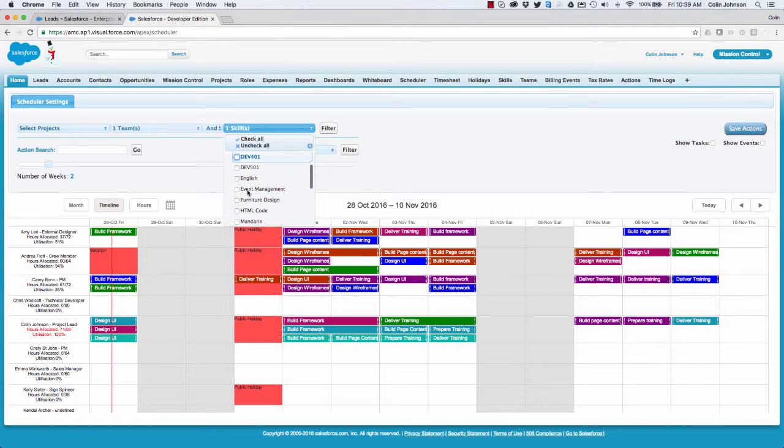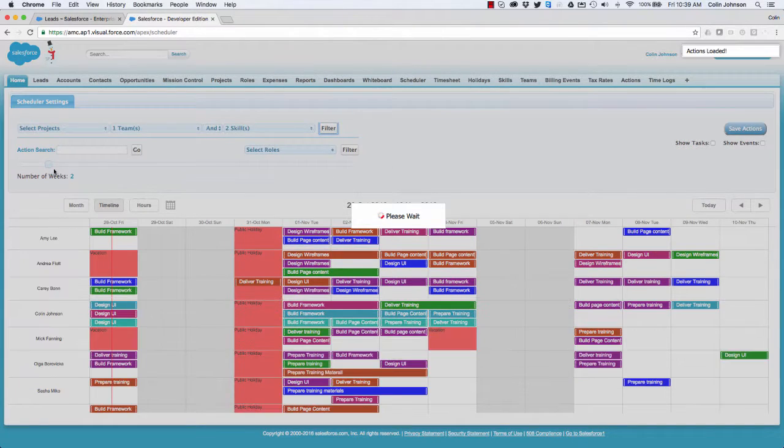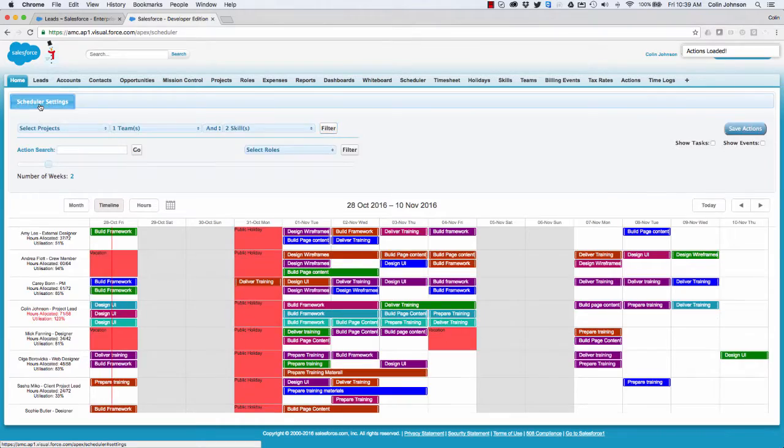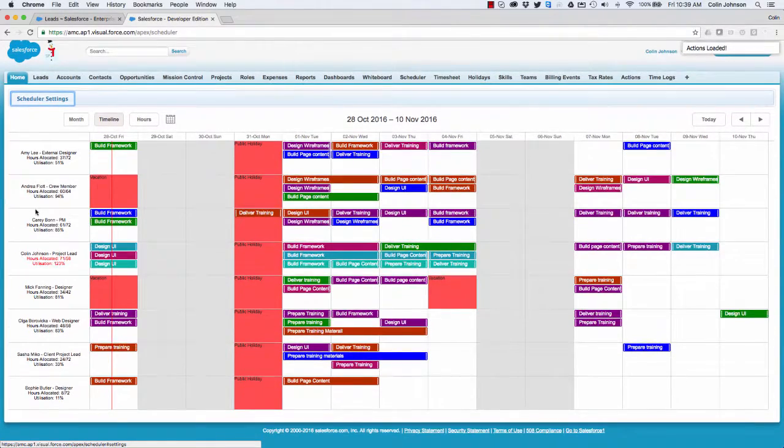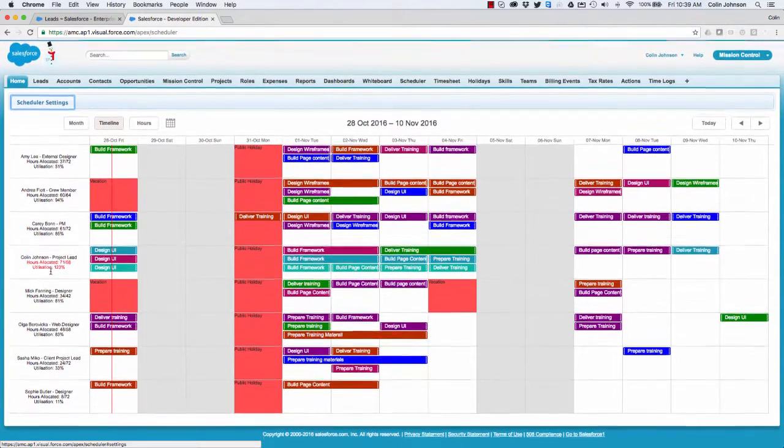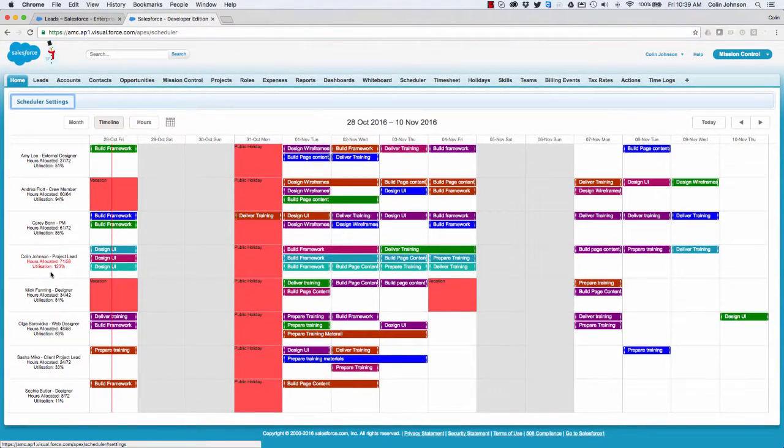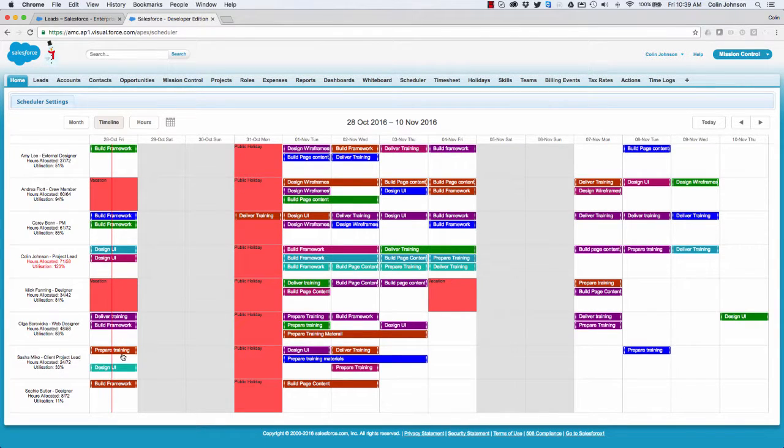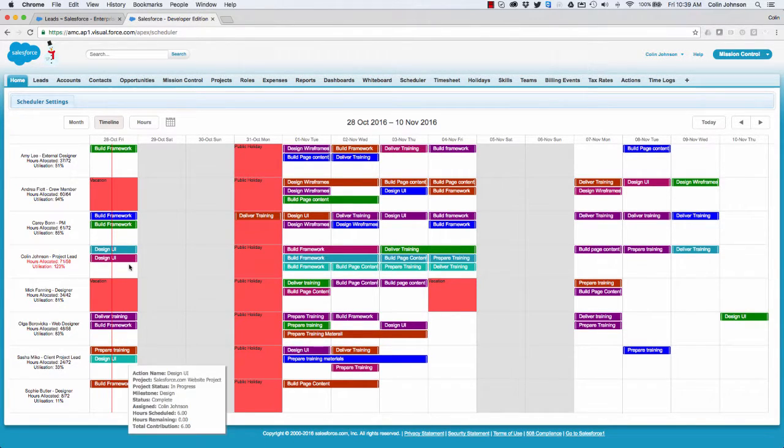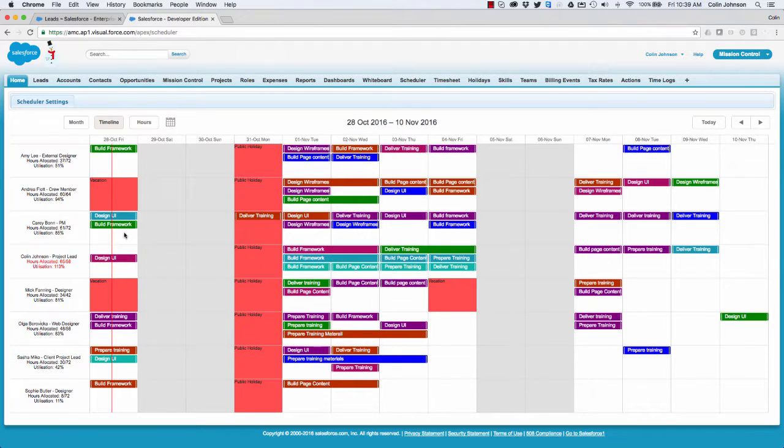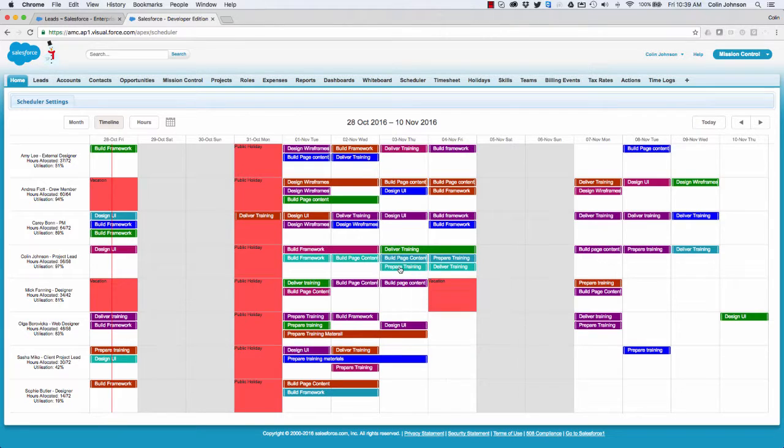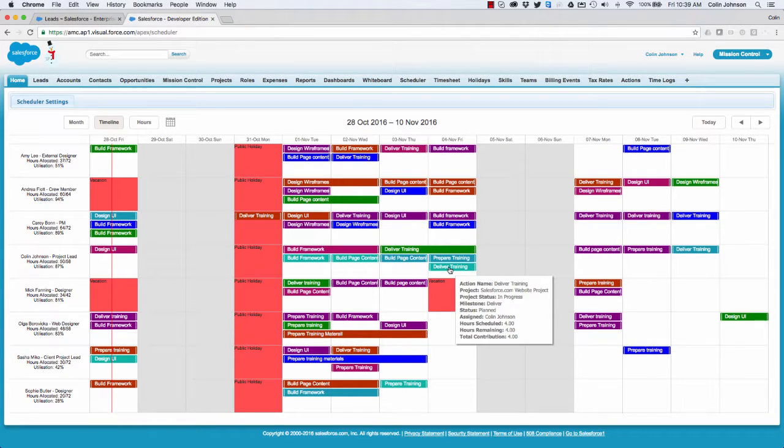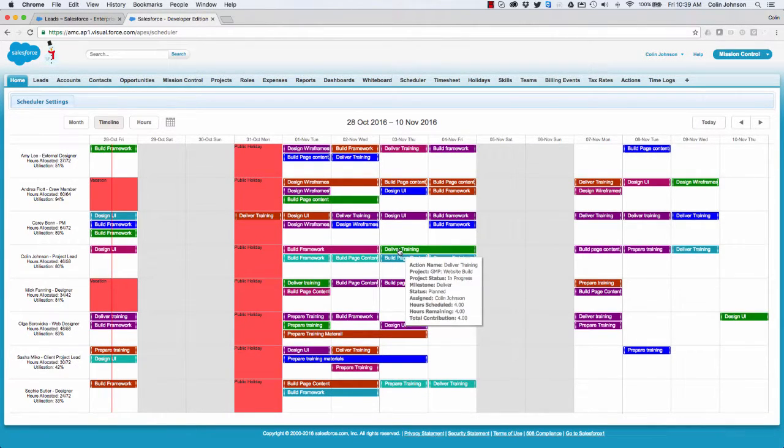Only show me people with these skill sets in their profile. So filter that list and give me a list of people I know that can do the work. So I've now got a much shorter list of resources. So what I'm able to do is actually drag and drop these actions off to other people, and as I'm doing that my hours are coming down and theirs are going up. So I'm able to distribute the load across the rest of the team, ensuring they've all got work to do.